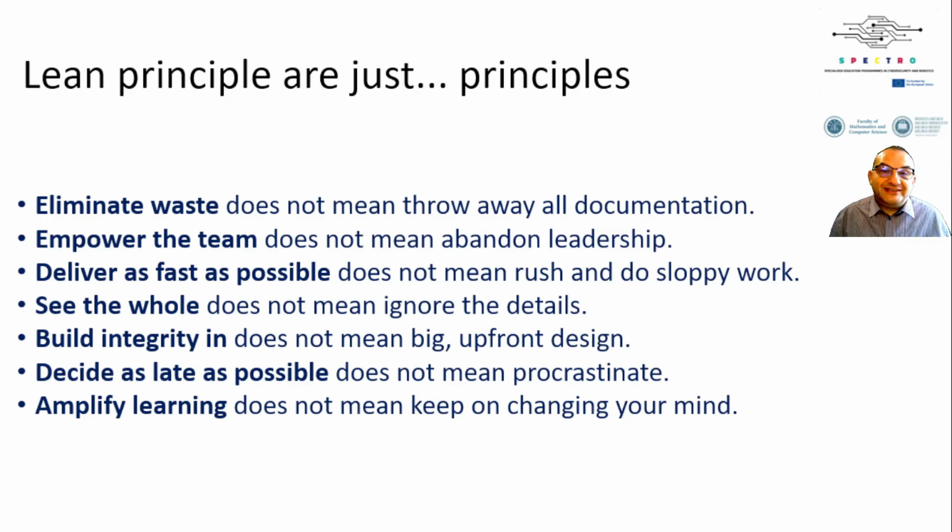When we talk about deliver as fast as possible, this is not an excuse to rush and produce sloppy work. It's about removing bottlenecks and streamlining processes to ensure smooth, high-quality delivery. And see the whole doesn't imply ignoring the details. It's about balancing the big picture while respecting the critical specifics.